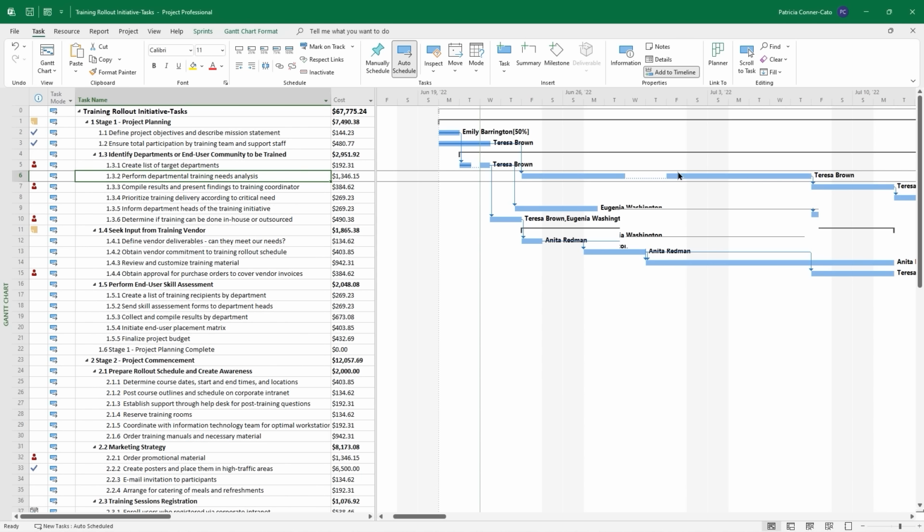And by the way, when you're having project level for you, one of the things it may do to get rid of the overallocation for a resource is it may split some tasks. So if you see a taskbar with a split and a dotted line in between it, it means it's been split. Once you split a task, you may want to document the reason why, and you do that via task notes.